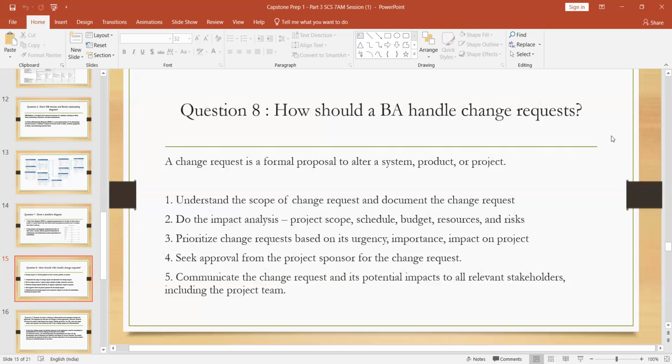And one more thing, whether any gaps will come up. Otherwise, if you accept that change request, maybe some gaps in the application get filled. Each and everything we analyze. Okay, based on the urgency also, we analyze that change request. Once that is fine, in the impact analysis we prioritize the change request based on the urgency and importance of the project, guys. Based on the urgency and importance, we prioritize whatever change requests we have.